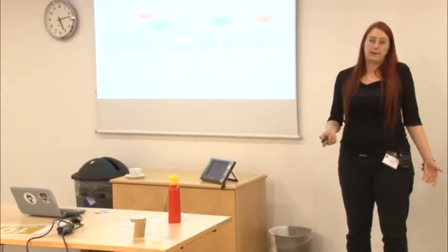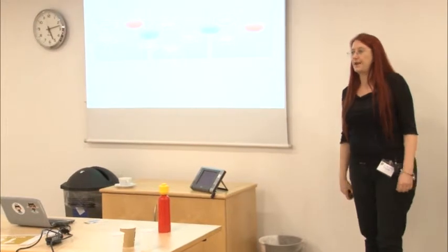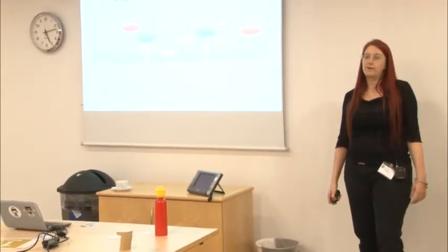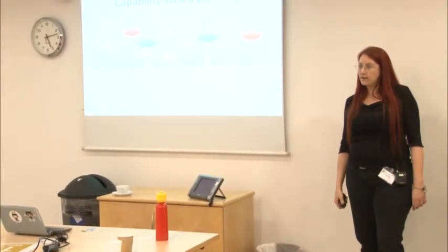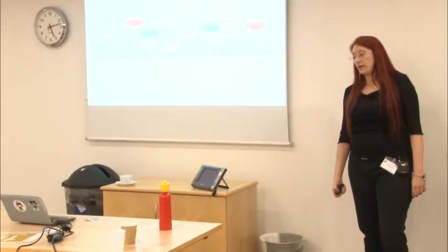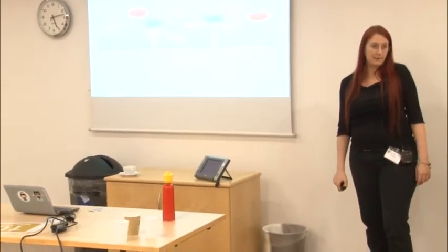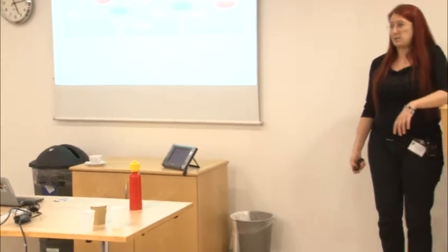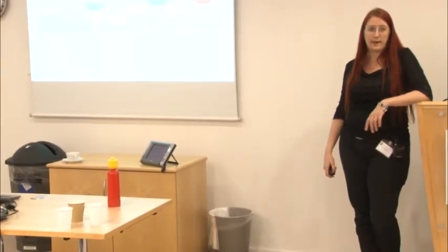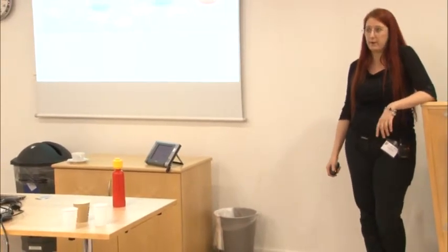And then I got them, because it was my first pass at doing this, to just put a red dot on anything that was new and they had never done before. And that was enough to identify the risk. We also, because we were being asked to do Scrum, put some story points on them. I said, which is the smallest? Call it 20. Which is the biggest? Call it 20 times bigger, 400. Is there one in the middle? 200? Yep, that one. Okay, well now we've got some range.